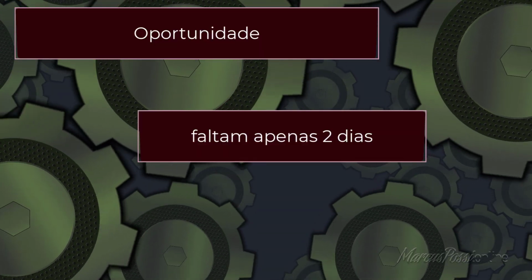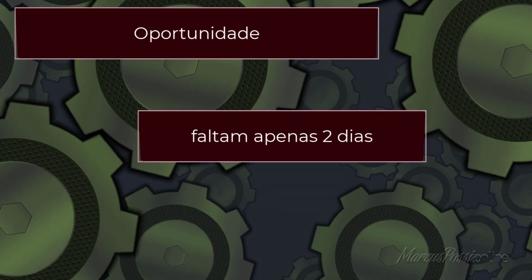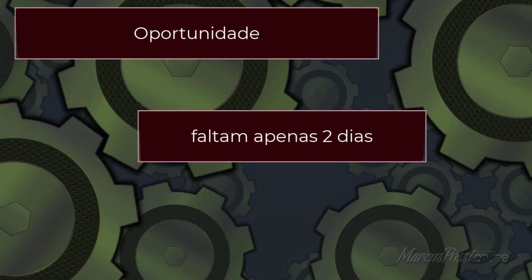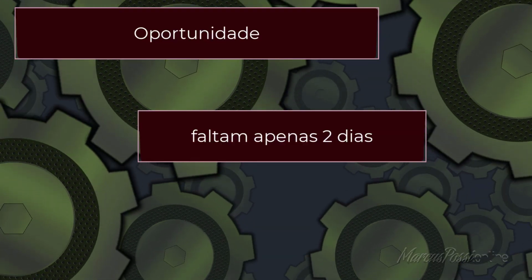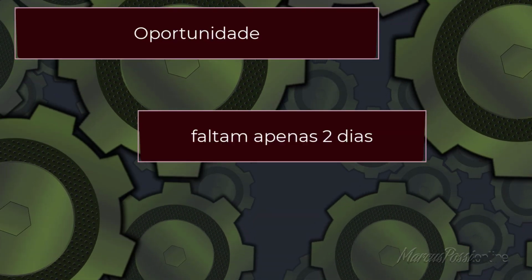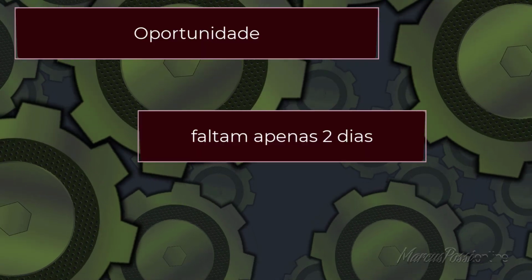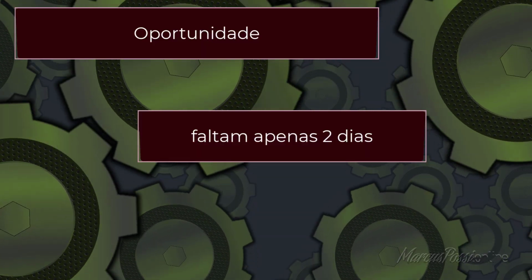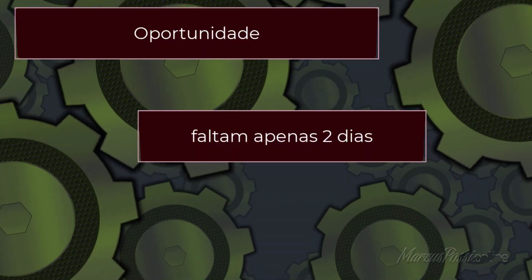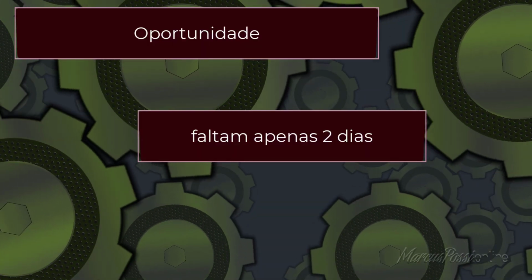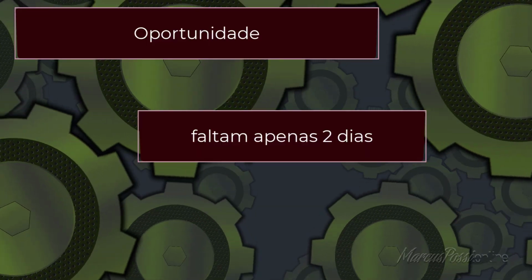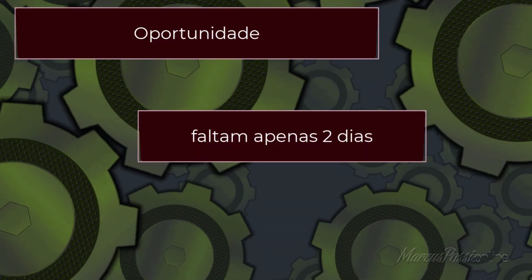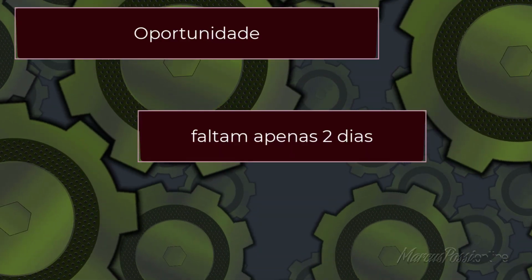Pretty standard stuff, but how is it approached in this basic but for experts course? The emphasis is really on consistency. Building the WBS hierarchically, linking scope to execution, yes. But the interesting bit is how you define activities. They make a clear distinction between production activities, which are driven by resource productivity and work volume, and duration activities, which are just fixed time blocks. Plus, you use remarks for notes and milestones as control points.